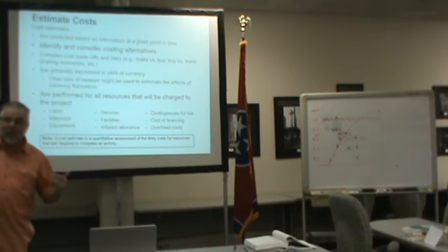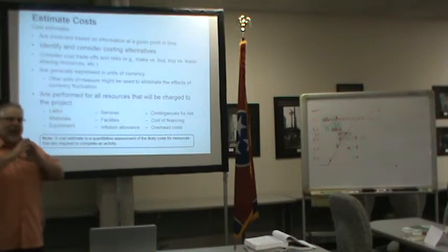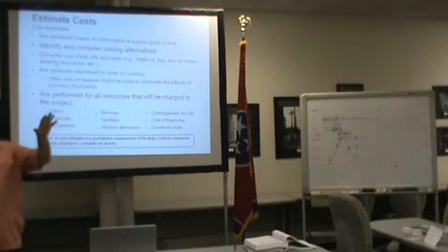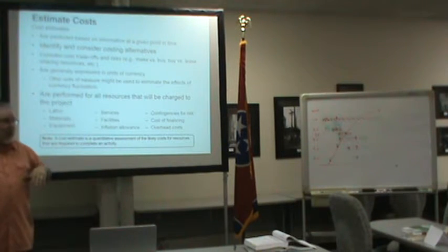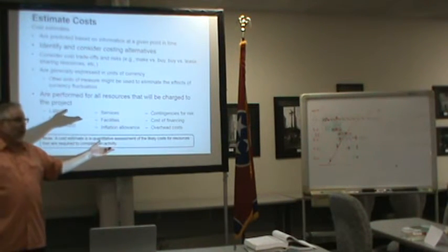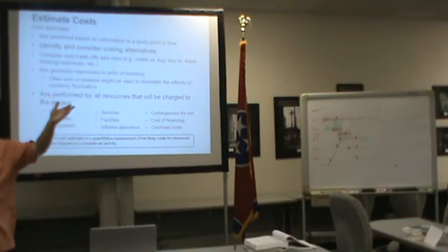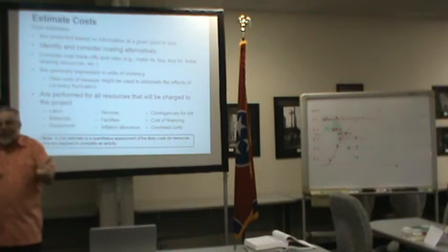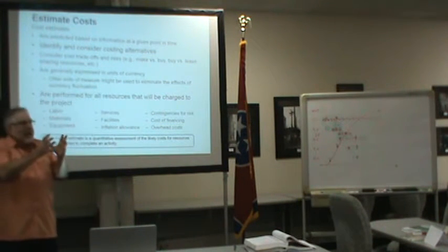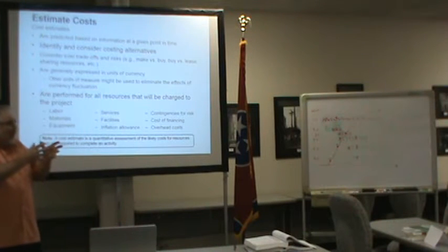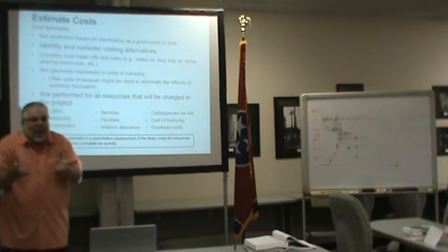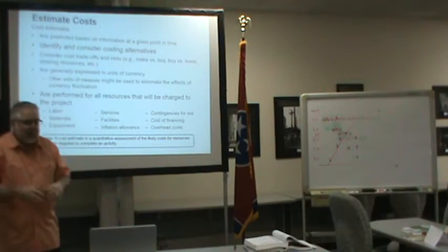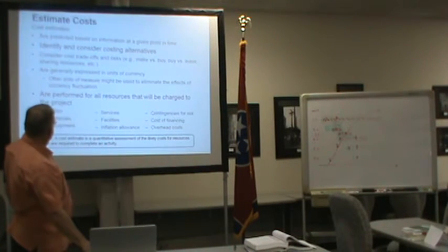So the point there for us is, and I'm kind of knocking on local because that's the experience I've got, but it's true if you're talking about underwater or if you're talking about working on a drilling rig. You know, there are standards. It takes longer than what it says in the Means Handbook to do jobs in special environments. Well, take advantage of that expertise when we do estimates.